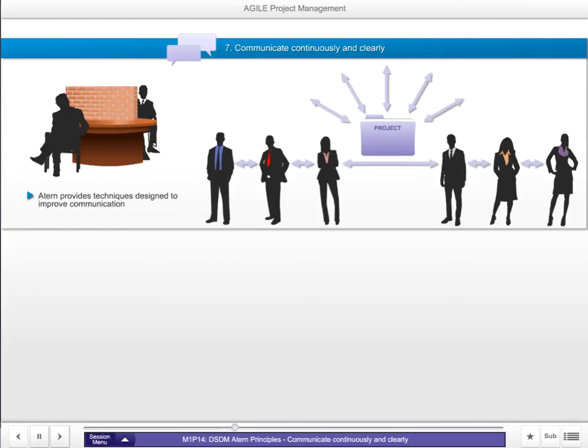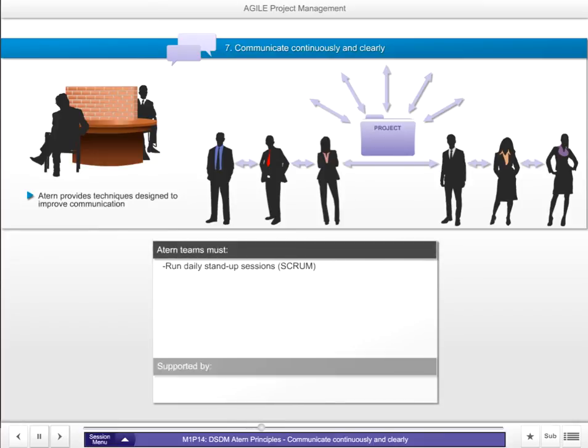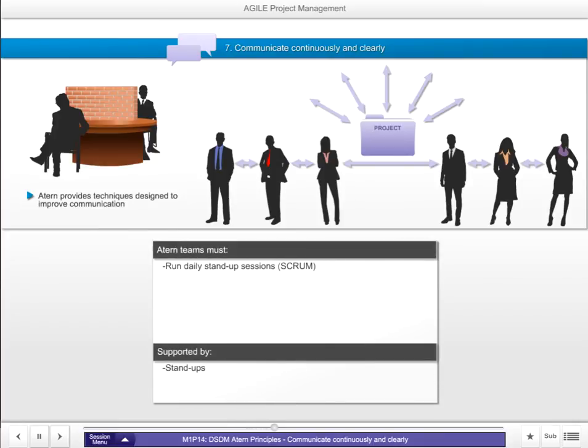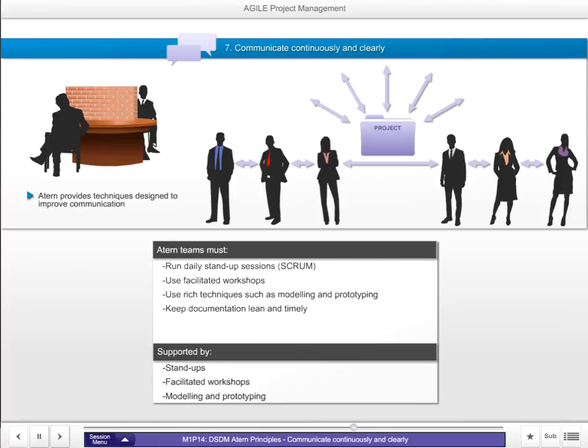ATERN teams satisfy this principle by running daily stand-up sessions, an idea adopted from the Scrum technique for managing teams, using facilitated workshops, employing rich communication techniques such as modeling and prototyping, keeping documentation lean and timely, managing stakeholder expectations throughout the project, and encouraging informal, face-to-face communication at all levels.